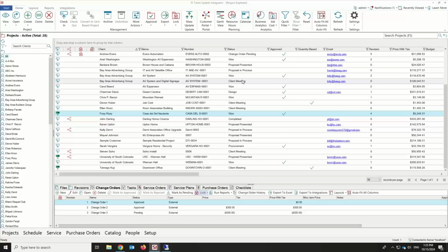You would go in on an approved project and just change the model number to something else. And the problem with that is we didn't see that as a change. It's still the item that has the same component ID. To us, it was the same, but it was a change. You could give it a whole new model number. You couldn't change the price on it, but you could certainly change that. And it wasn't triggering changes on revision compares or anything like that.